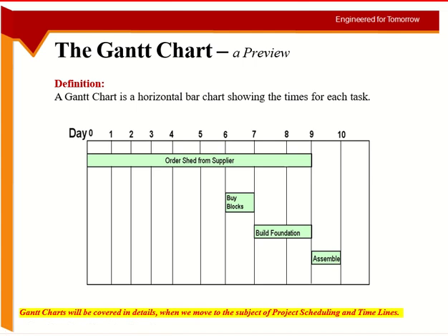But buying blocks will not take time. Building the foundation will not take days. You can see it takes 2 days, fine, but it does not need the same amount of time. And buying blocks, you go to the market and buy blocks, you don't have to order them from somewhere. You can see they are using different terms here, ordering and buying. Ordering usually is for a long haul item which is coming from somewhere. It usually takes more time. And buying is you go and buy. It's immediate.